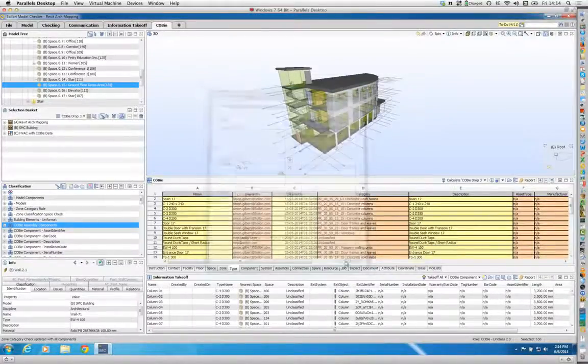Once you've done that, very much like what we did here with generating the Cobie drop 3 from a selection basket, we can set the selection basket to equal one of the work packages. When we calculate based upon the work package, it will go away and show you just the sheet which is related to that subcontractor, or where you've tendered it out. When you've reported the Excel spreadsheet, they can go out as those packages.